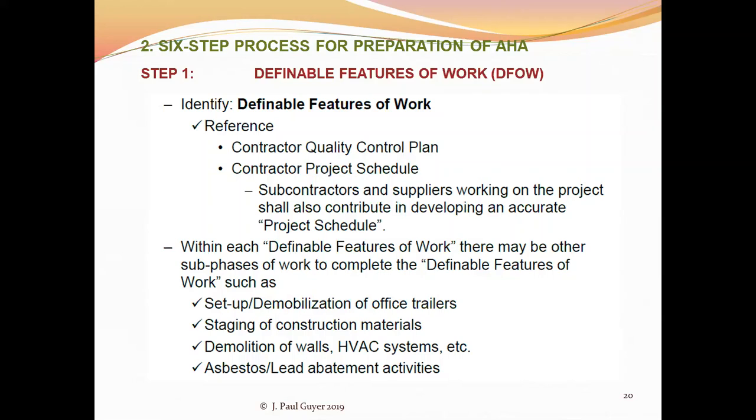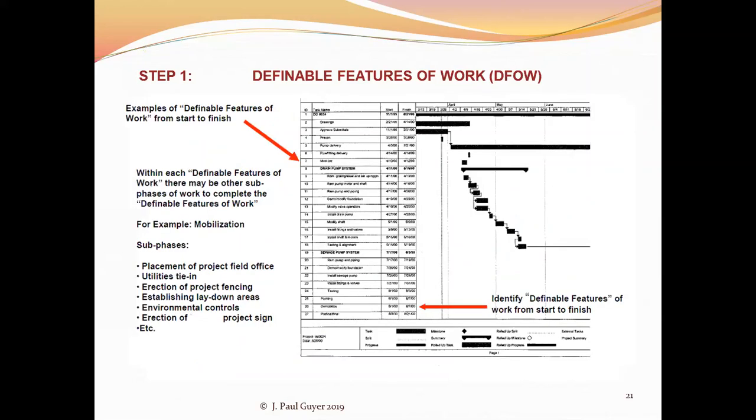So in this first step, the definable features of work, a good clue as to what they are is the construction schedule. And here you see the typical bar chart construction schedule. And these come pretty close to defining the features of the work.